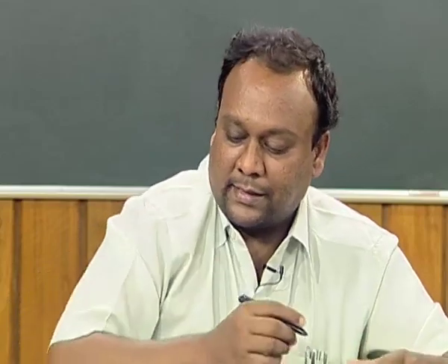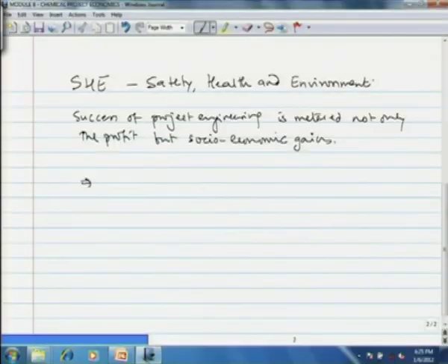Apart from financial aspects, there are legal and statutory matters that need to be addressed. For example, there may be legal matters pertaining to conversion of land into non-agricultural plot. There might be some public interest litigation against the project. So, you have to take care of all these things. Then the site specific clearances have to be obtained before you actually start the construction activity. And many times the market forces control the success of any business proposition. Market forces are very important.